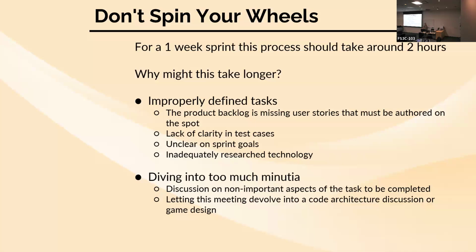Right, if we start going into that discussion and we're talking about what type of variables each save value should use inside of our save system and what order they should be saved in so we can load them correctly, we dove way too much into the minutia of that user story, because that's not going to change the estimation of the task.